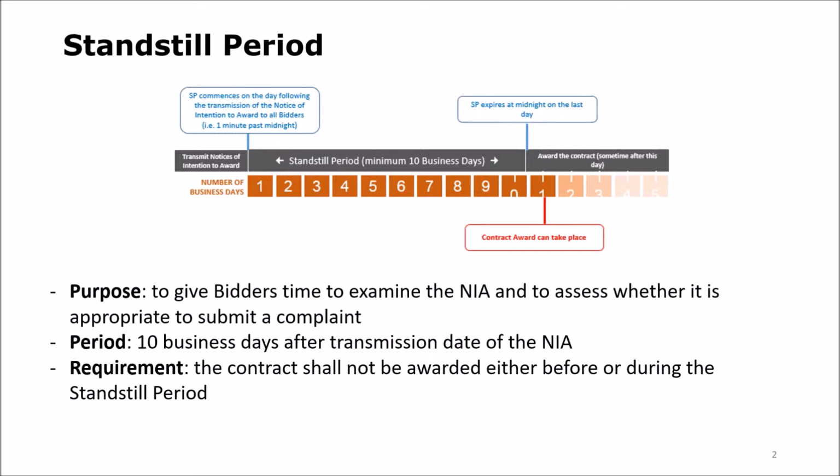You should refer to the bank's procurement regulations for IPF borrowers to get more details about the requirements for notification of intention to award and standstill period, including situations in which standstill period is not applied. The regulations can be accessed from STEP as guided in the module Create Procurement Plan. In STEP, you are required to notify the bank of the issued notification of intention to award and its issuance date and the original ending date of the standstill period if applicable. Let's see how to do it.